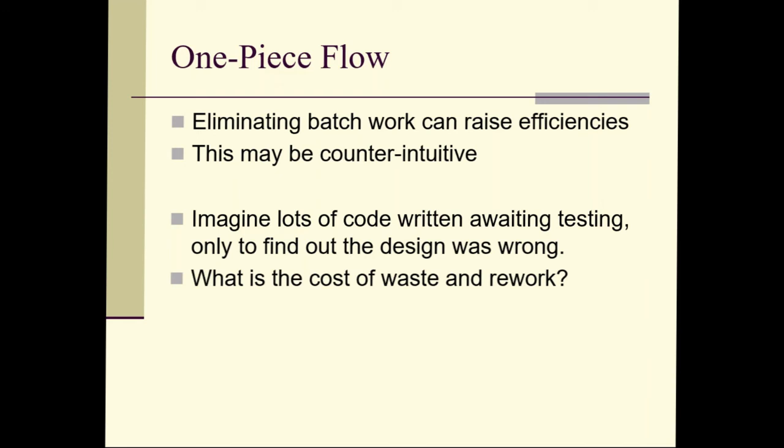Here's another example for software development. Imagine you've written tons and tons of code, awaiting testing. Instead of building a piece of code, testing it, getting feedback to change your code and learn what practices are working, let's just write tons and tons of code that hasn't been tested yet, nothing's working, and then we finally get around to testing it and realize the design is wrong. Now all that coding needs to be thrown out. Wouldn't it be better to build a piece of code and test it to see if it works, the design is stable, before you write the next piece of code?